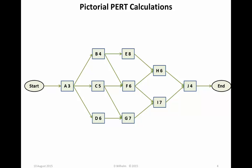Here is a typical pictorial PERT representation to determine the cumulative elapsed time, the critical path, and the critical task. The first step in this representation is to determine the topography, and then simply transfer from the table to the diagram the task IDs, their execution times, and the task dependencies as are indicated by the arrows. Then, going from left to right, calculate the elapsed times after each task.